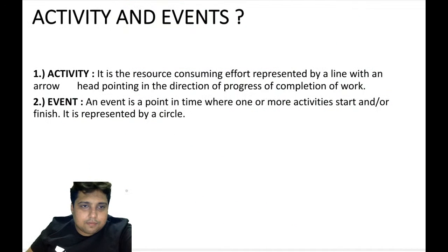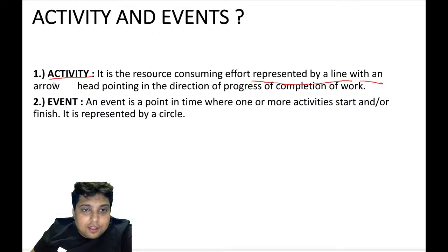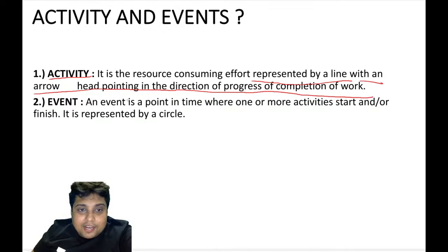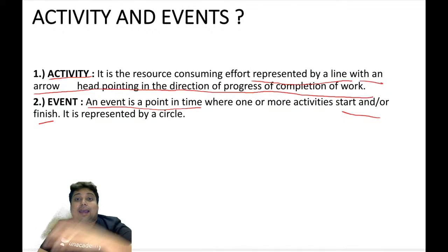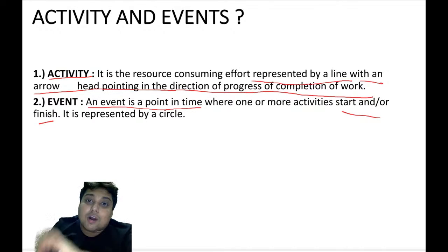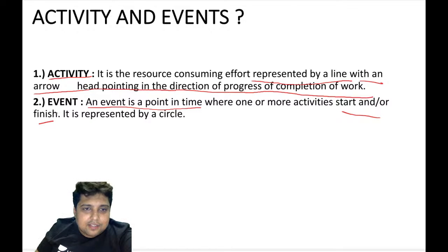See, I already told you I will be getting back to this slide. Activity. What is an activity? It is the resource consuming effort represented by a line with an arrowhead pointing in the direction of progress of completion of work. Event is a point in time, as I said, a moment in time, where one or more activities start or finish, where some work starts, some work finishes. I told you, some work will start on some date, and finish on some date. An activity will start on a certain date and end on a certain date, and it is represented by a circle.